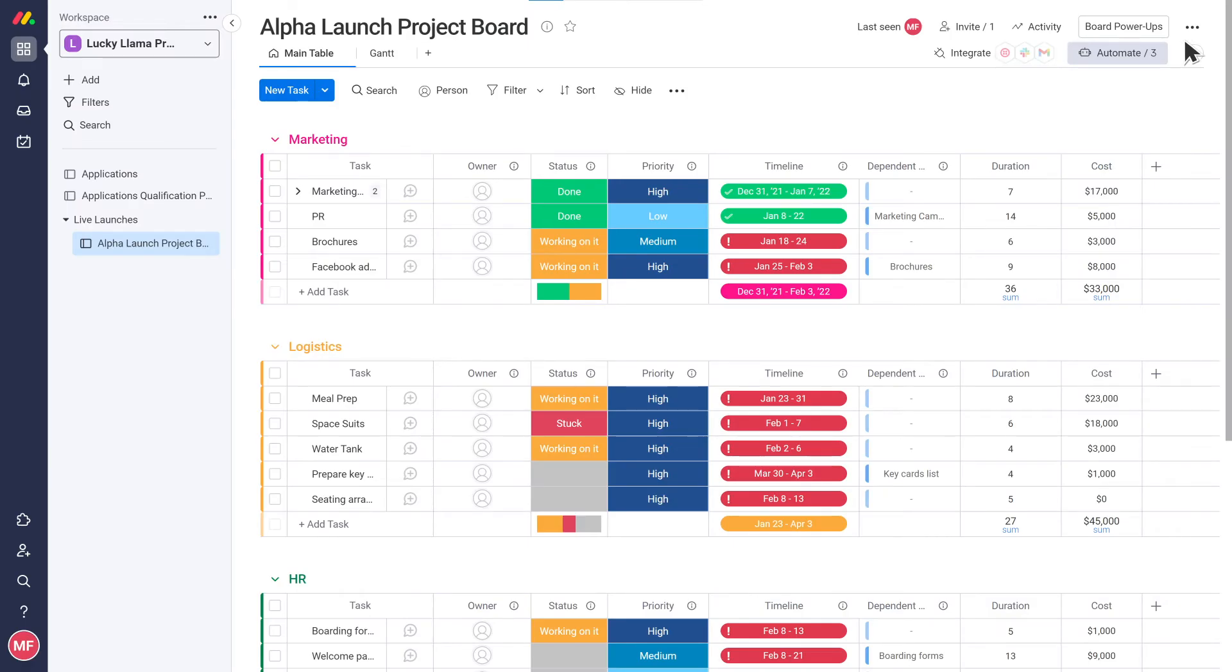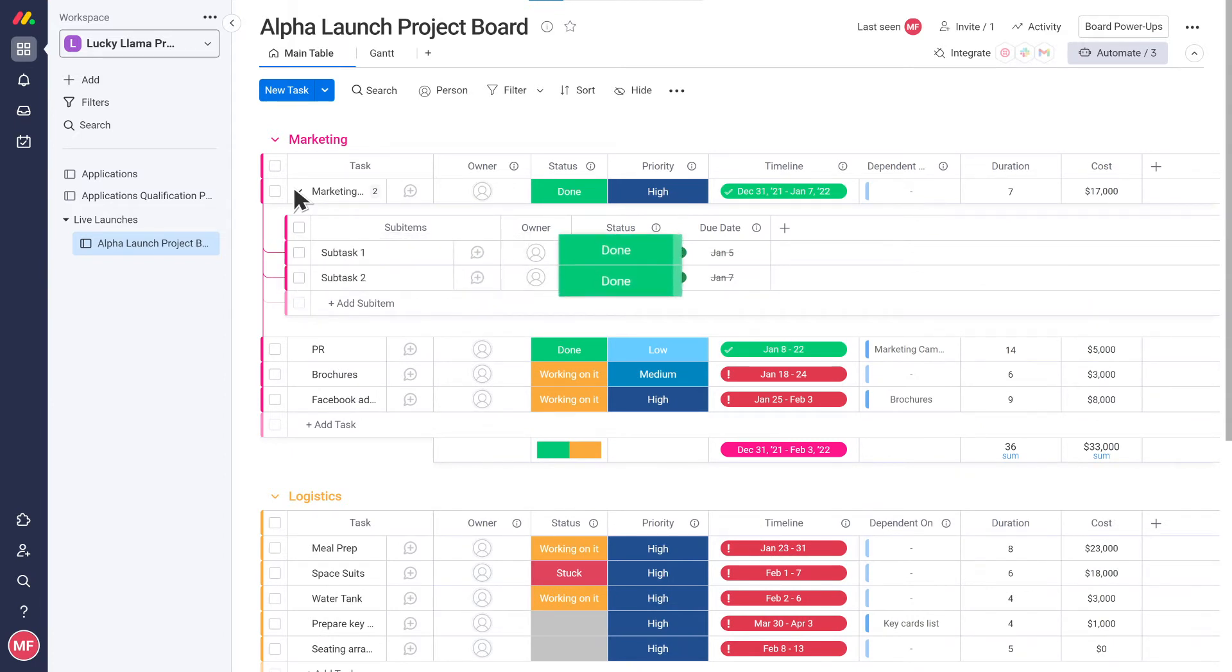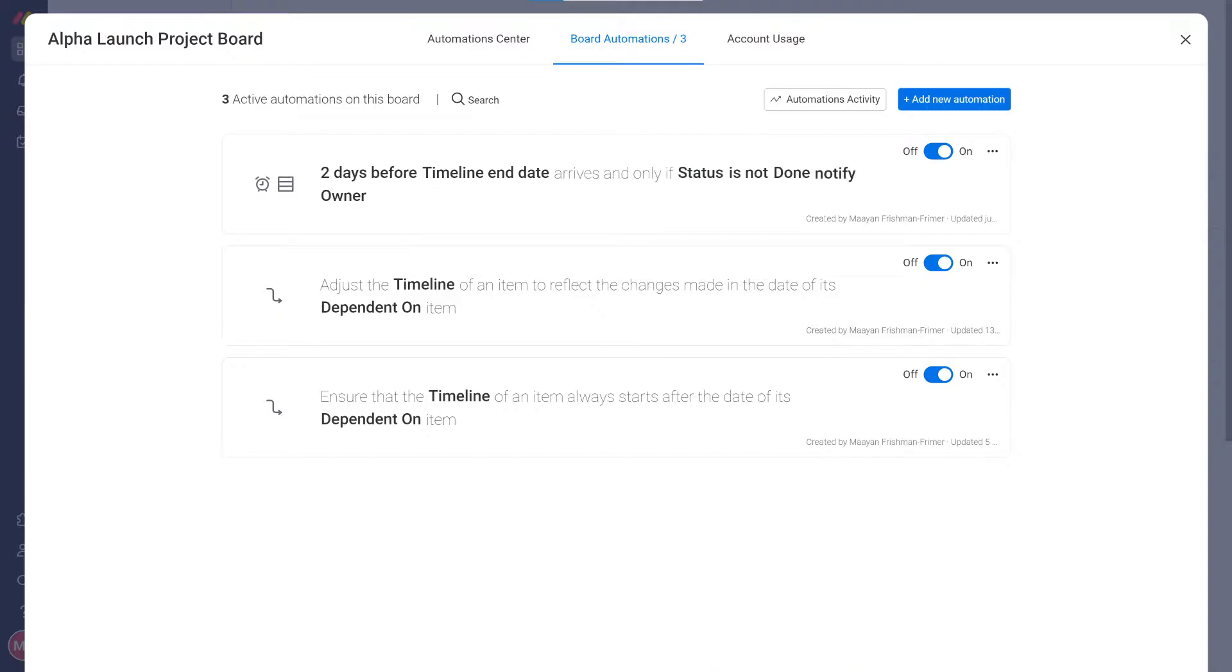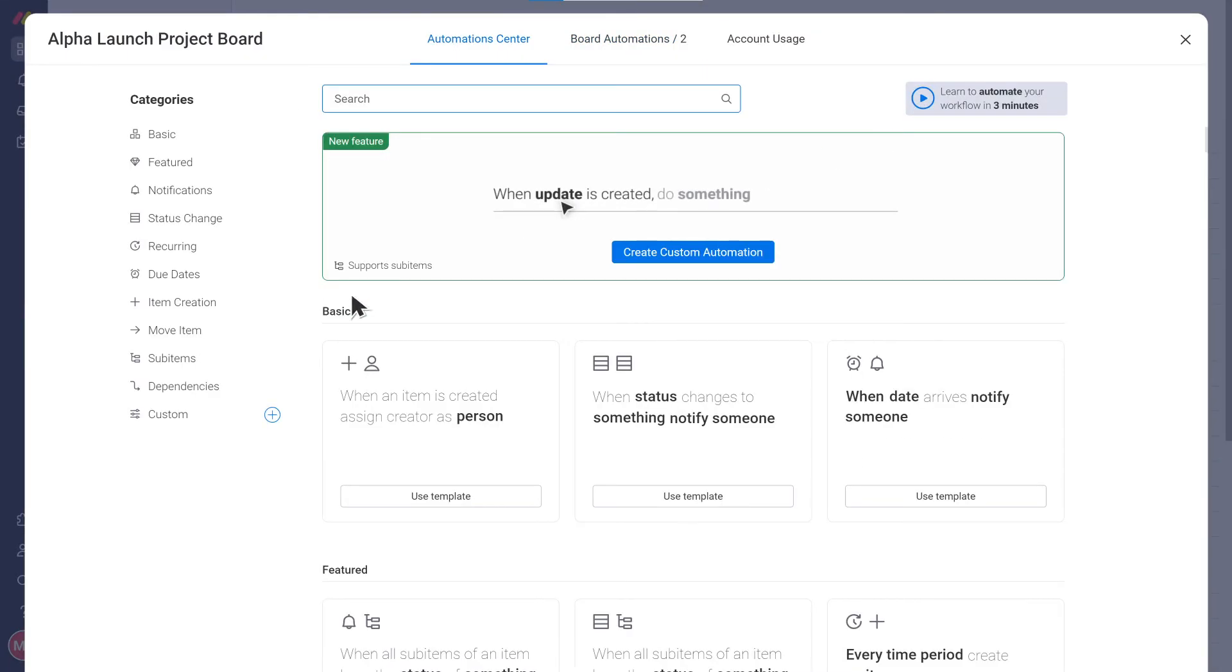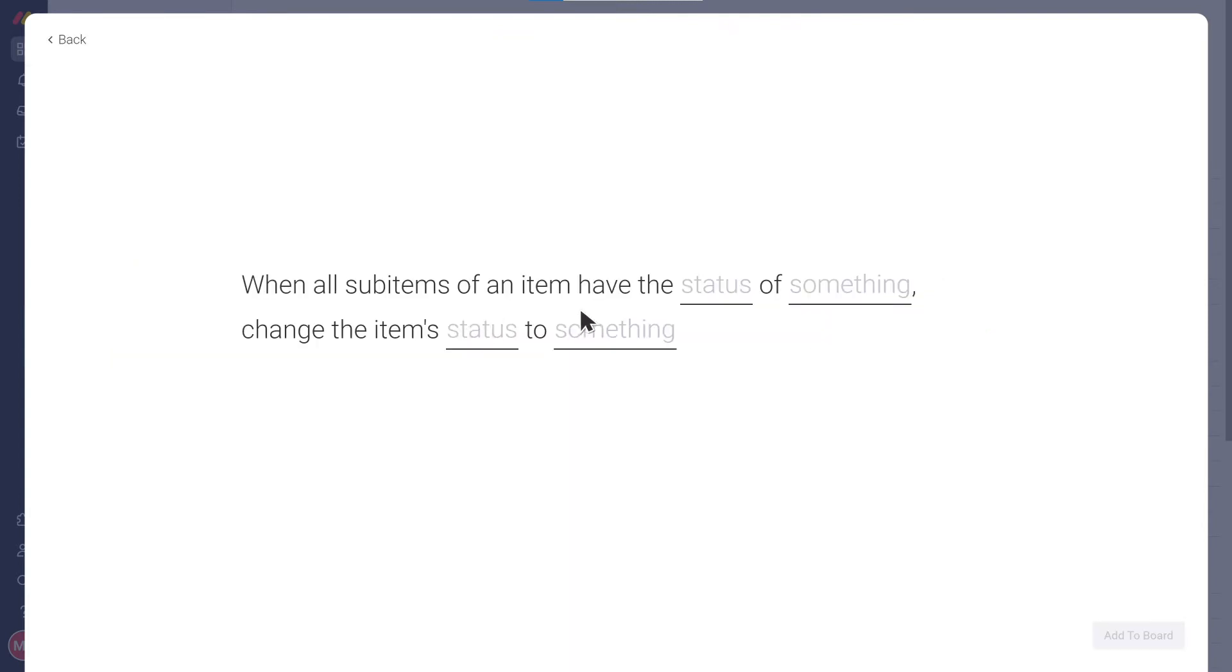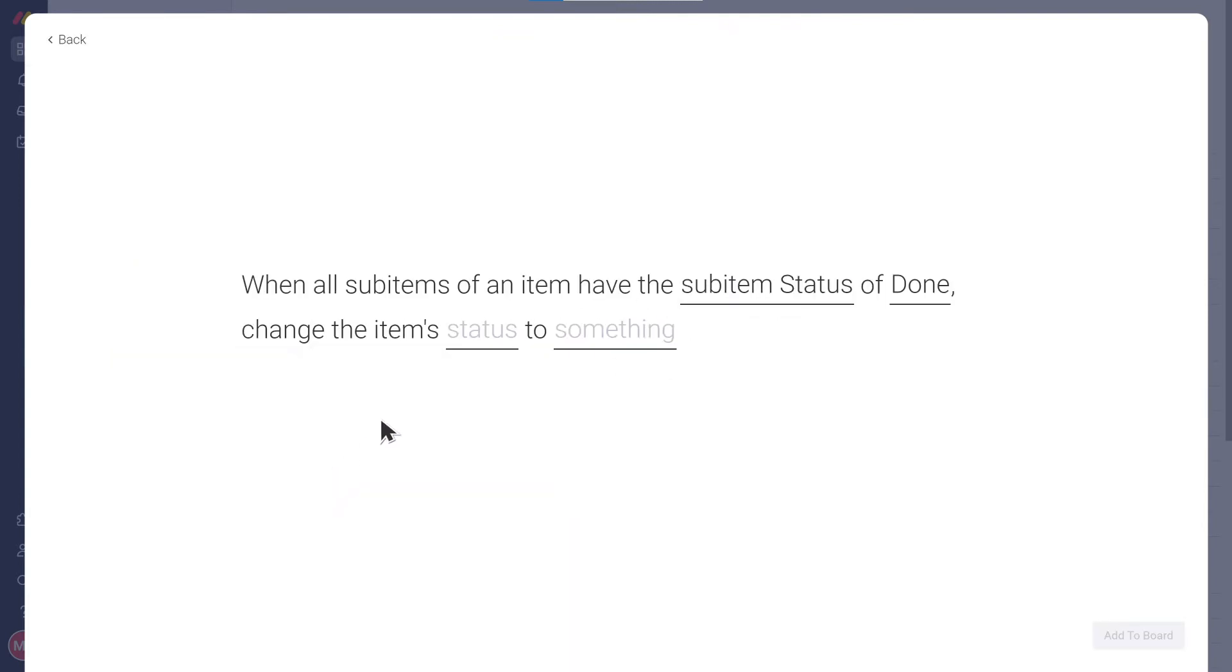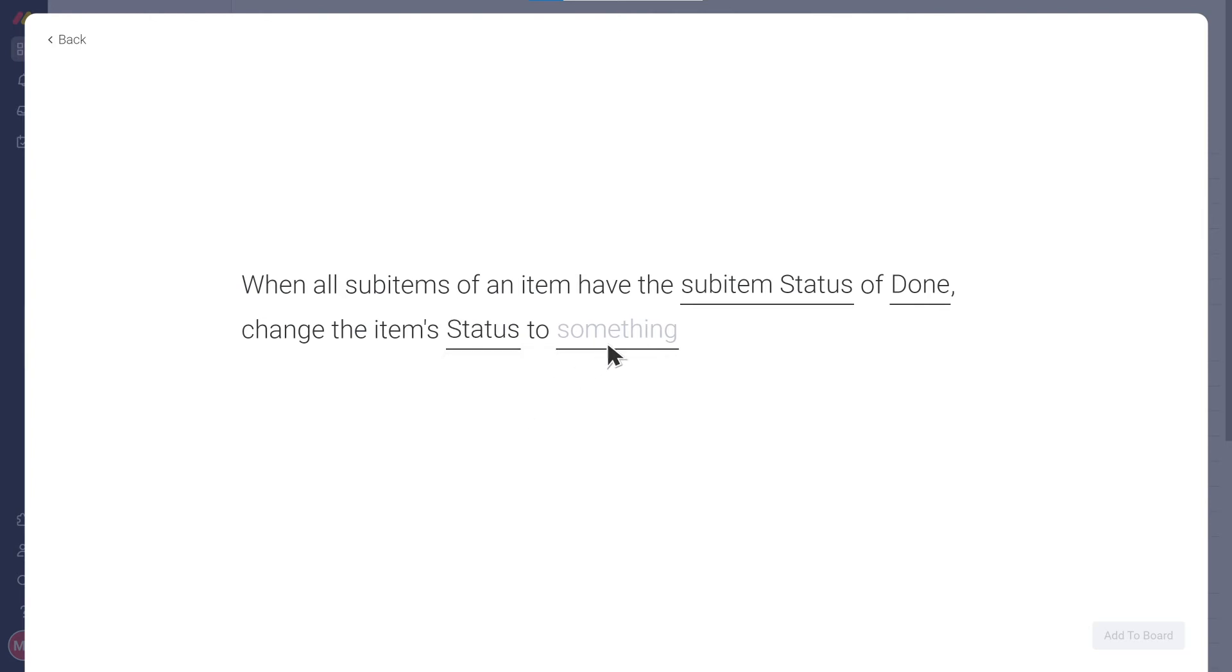Looks awesome! One last thing I'd like to do is take care of my task statuses. I have lots of big tasks which I've broken down into subtasks using the sub-items. I have a separate status column for my subtasks. When all of the subtasks are marked as done, I'd like this to be reflected in the item level status column automatically. No problem! We can easily automate this using the automation: when all sub-items of an item have the status of something, change the item's status to something.